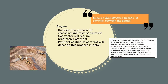Section 42.1 of AS4000 describes how, at the time specified in the contract for making progress claims, the contractor is to issue to the superintendent — the contract umpire — a payment claim with supporting evidence of how much money they are owed.